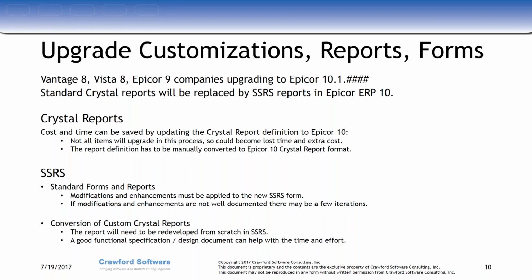There's some time there, and it could be some time lost for items that don't work in 10.1, but you have an opportunity to greatly reduce the scope of what you need to do as far as customization and enhancements, mainly from that timeline perspective, to get the project done quicker, and then convert them into SSRS on a more, for lack of a better word, leisurely pace, and not have a direct cost impact to this timeline.